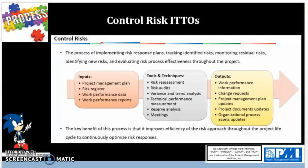Variance and trend analysis is where we look at earned value management formulas, which may be used for monitoring overall project risks. Technical performance measurements compare technical accomplishments during project execution to the schedule or technical achievement. Reserve analysis compares the amount of contingency reserves — money set aside for known risks that have been accepted — to the amount of risk remaining at any point in the project to determine if the remaining reserves are adequate. You'll also monitor management reserves to ensure money is set aside for unknown risks. Finally, meetings allow the risk management team to review risk control activities, and can also be led by the business continuity management team.